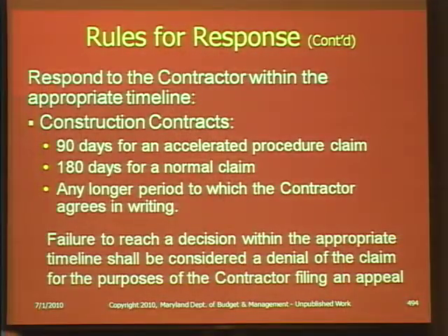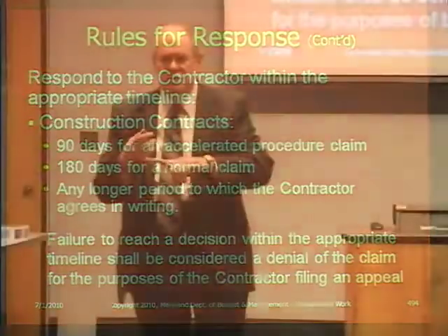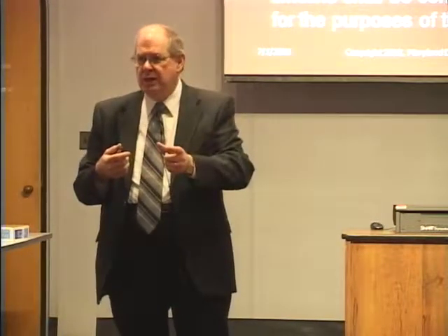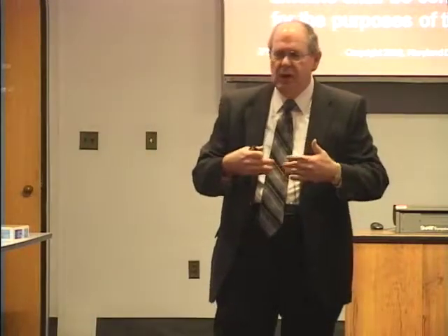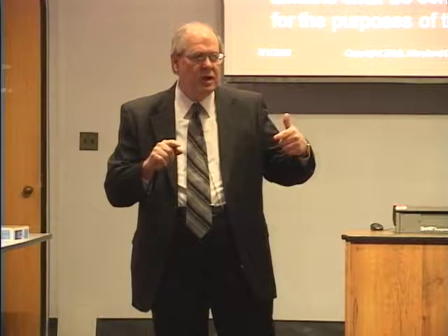And so once the contractor got the denial, the contractor filed an appeal of the denial. And the decision of the Board of Contract Appeals, and let me go to the next slide. Well, let me see. All right. Decision of the Board of Contract Appeals, they have, probably it's in a couple slides from here, I think they have 30 days from the date they get notice of the disposition of the claim to file an appeal. And in this particular instance, whatever the time frame that the procurement officer took to respond was more than 30 days beyond the 180-day time frame. So when the vendor responded within 30 days and appealed the decision to the Board of Contract Appeals, what the agency did, and of course you'll love this, is say it was a late appeal because it wasn't filed within 30 days of the 180th day.